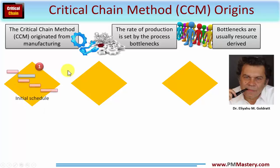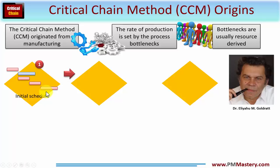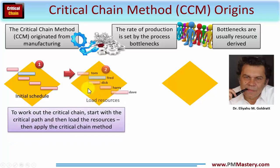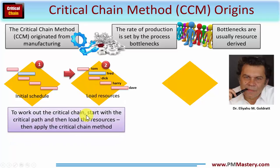Starting off at a fairly high level, step one would be to form your initial schedule within a Gantt chart, as shown here, which leads to step two: deriving what the critical path and critical chain actually are. To work out the critical chain, you start with the critical path, then load the resources, then apply the critical chain method. At this juncture the project is loaded with resources and you have a schedule in place.